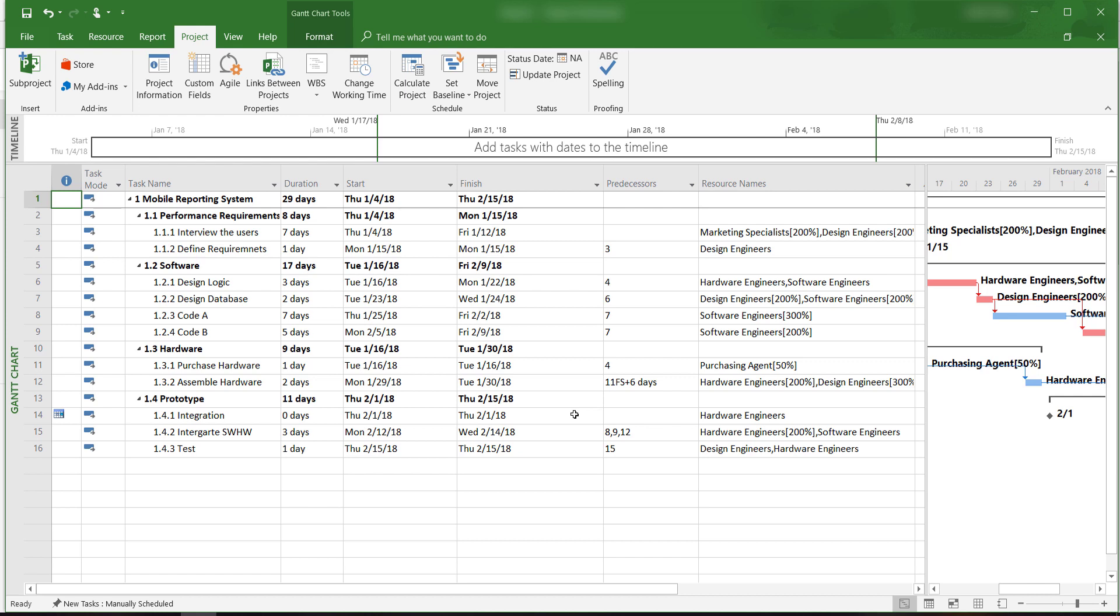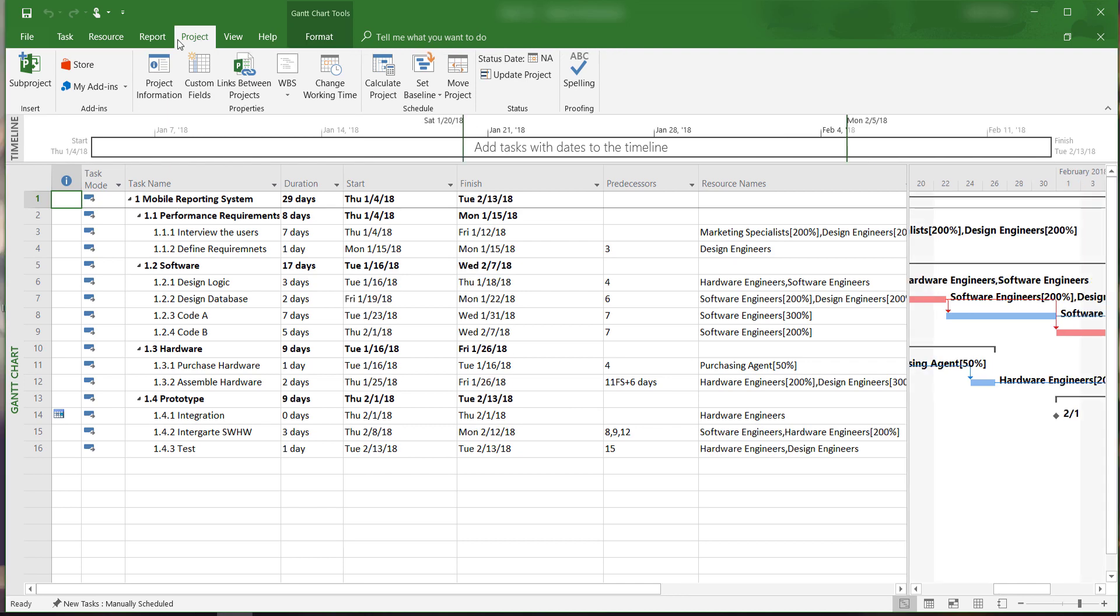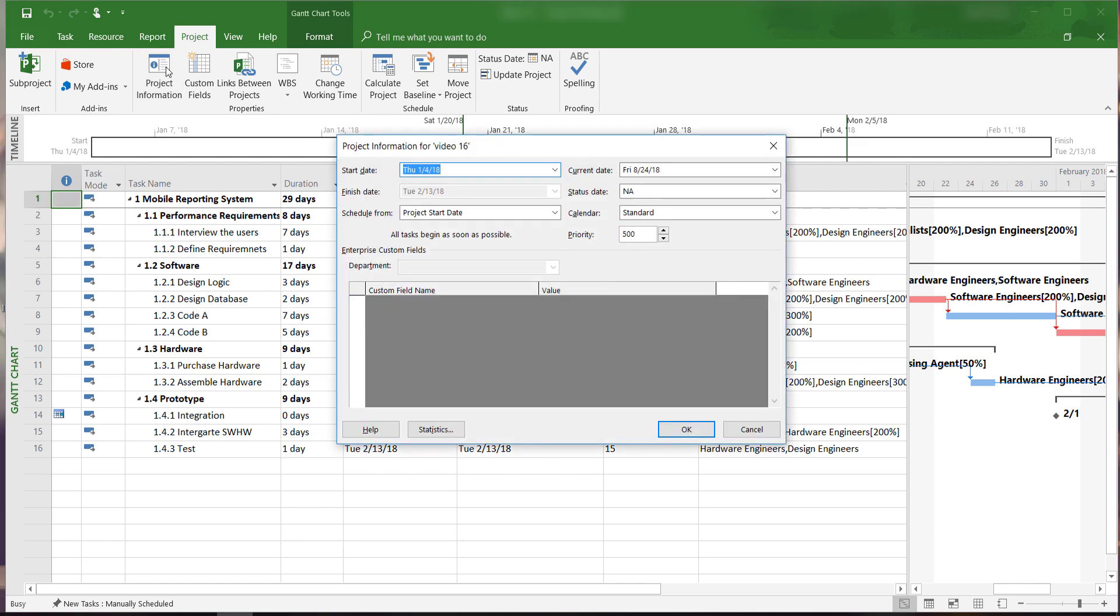Before we create a status report, we need to enter a status report date. There are several ways to do this. First, select the project tab and then click on project information.